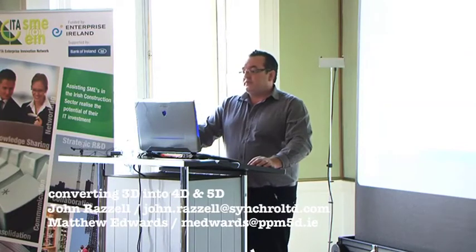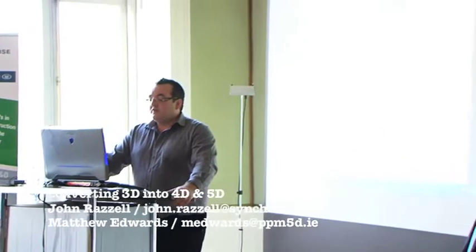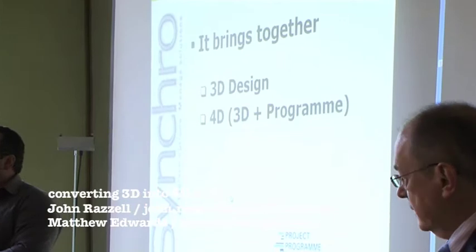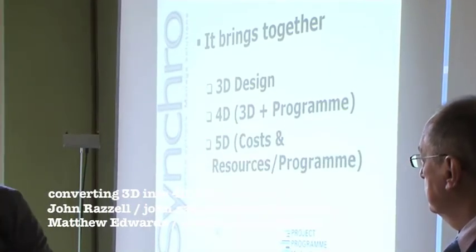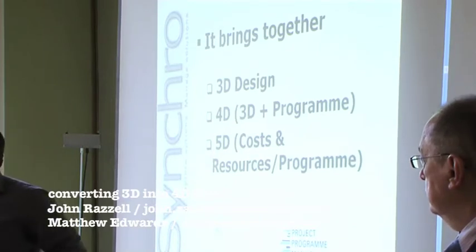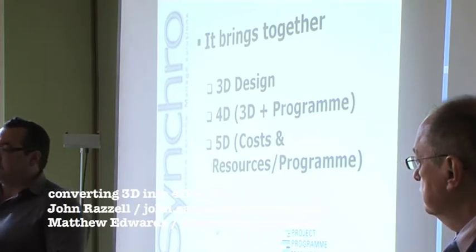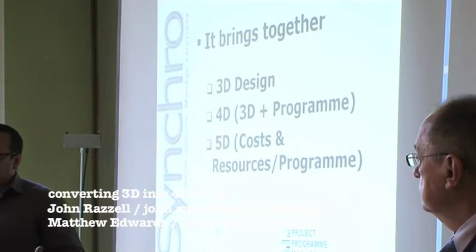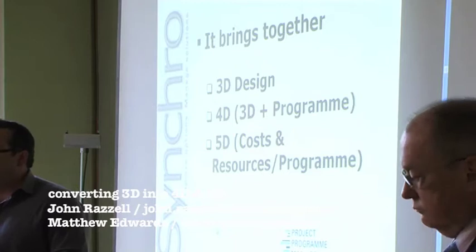Okay, so what is 4D, 5D construction? It brings together, as I said before, 3D design, 4D, which is the 3D plus a program. People sometimes refer to program as a schedule as well. 5D, which is costs and resources / program. Now 5D can happen at different stages. It can happen at estimating stage, or it can happen at live contract stage as well. Most contractors in Ireland would use, in my eyes, the 5D estimating stage.